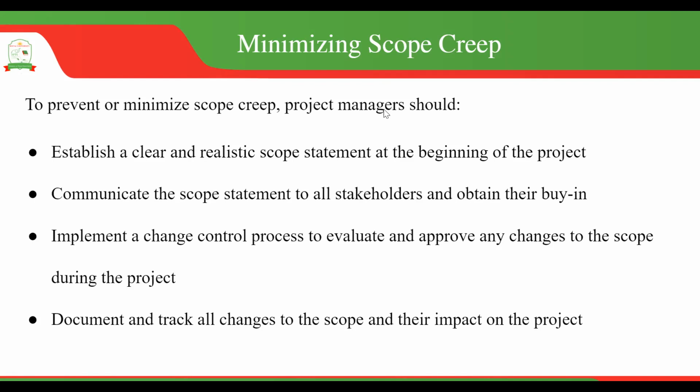What is very important is that you don't just erase what the scope was initially and then put the new one. Leave the old one there, adjust the new one, such that you have a clear follow-up on the changes that have been made across the project duration.